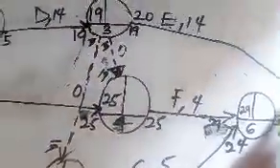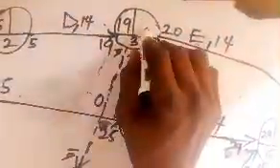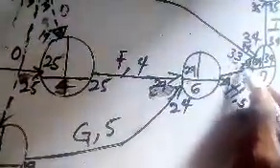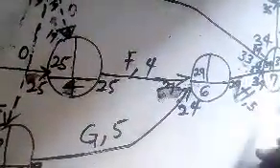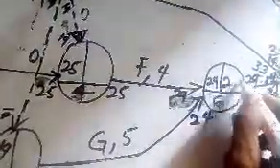So we have this 34 minus 14, we have it as 20. So 20 wouldn't enter yet. Let's consider this node. That is, I need to come back here. So this 34 that came out here minus 5 is what? My 29. So 29 will enter here.